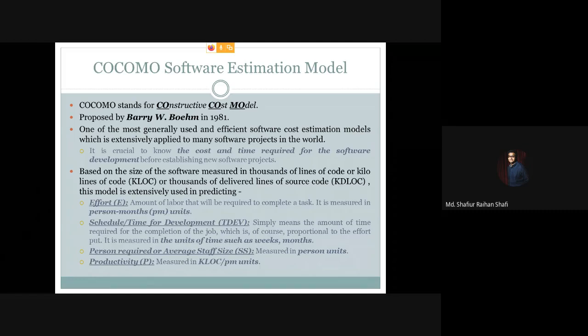The last thing to predict is productivity. Productivity is measured in kilolines of code per person-month — that is, how many kilolines of code are produced per person-month. This ratio is called productivity. So the COCOMO model is used based on the size of the software, which is measured in KLOC.